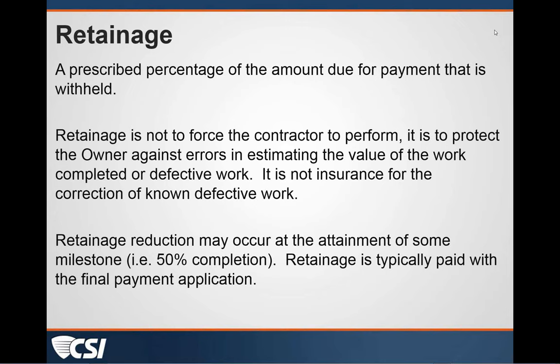It also should not be used as a ransom for closeout documents. And we're going to talk about schedule of values here in a bit. But closeout documents should have their own line item on the pay app, and retainage is not a line item set aside for closeout documents.